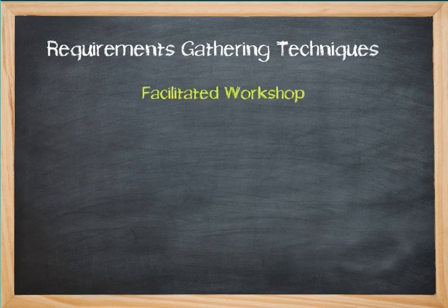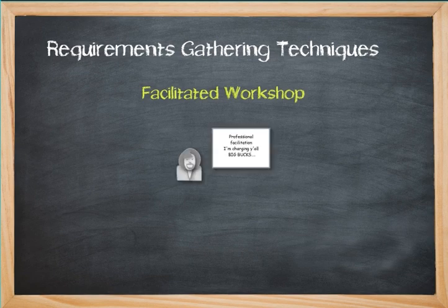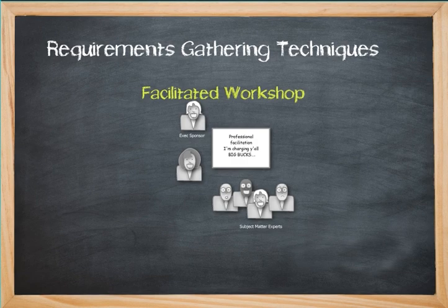The third way is a facilitated workshop, and this is where you gather requirements with a professionally run workshop, and this can be pretty incredible. You have a facilitator, usually someone highly organized who does this as a consulting relationship. It's commonly known as a JAD, J-A-D. This is where you have a joint application design effort. This approach has specific roles, and you probably participated in one of these, but you just didn't know it. In this case, we have the facilitator over there with a whiteboard or whatever their technique is to get the information, and you have an executive sponsor. You have the team, which is the subject matter experts. You also have a scribe that takes notes and keeps track of everything.